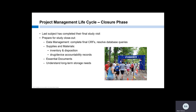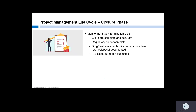For FDA-regulated studies, be prepared to contact investigators to get a final financial disclosure form one year after the study closes — make sure you retain their contact information. Understand plans for long-term storage. Are paper documents going to be sent off-site for archival? Where are they going? How will we retain access to electronic files? Now we're prepared for the monitor to complete their study termination visit. They will tie up any loose ends with the CRFs, make sure that the regulatory binder is in order, and that the IRB closeout report has been submitted. They'll also do a final reconciliation of the drug or device accountability records and disposition of any remaining product.